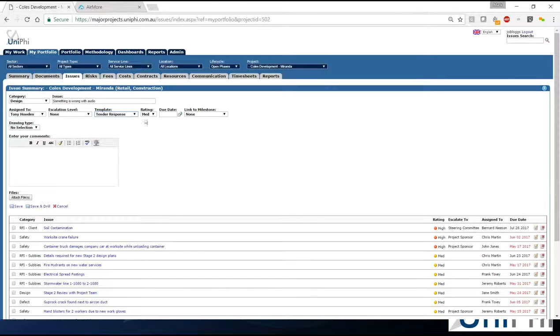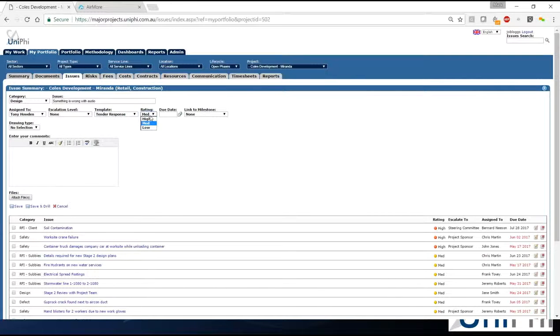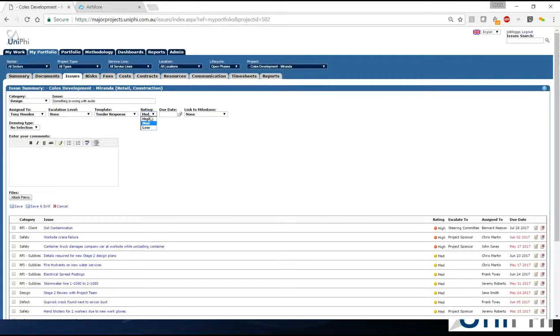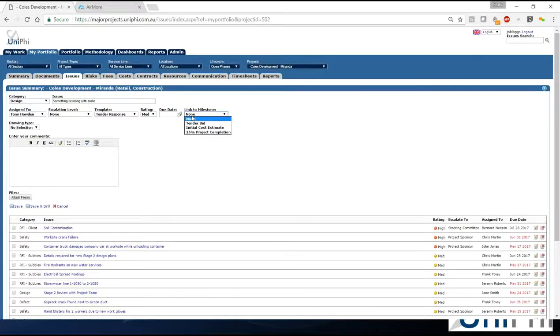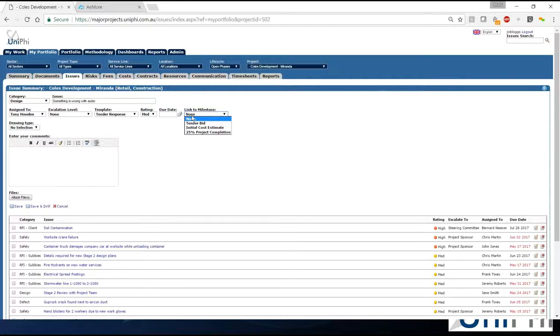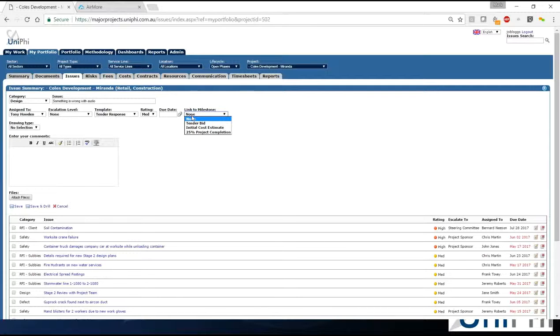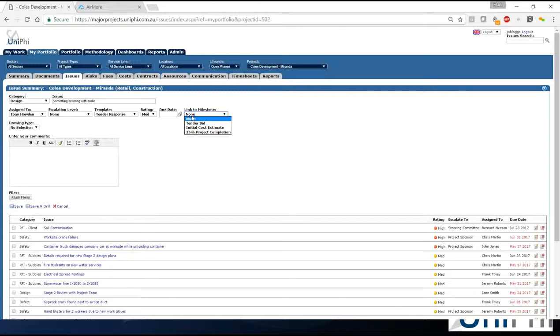High, medium and low can mean whatever it means to you, but that is actually one list that isn't configurable. It's a standard list of ratings. So you've got three ratings for an issue, high, medium and low. Set it a due date. This is completely new. No one on the call will have this drop down in their system at the moment. This is our ability to link it to a milestone. What that means is milestone will have a date. The issue's got a date. If the issue due date goes past the milestone date, then it pushes out the milestone date.